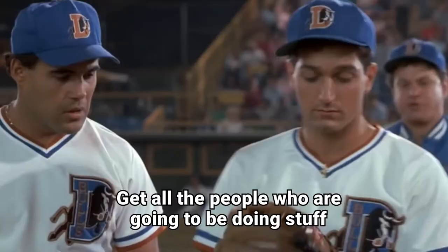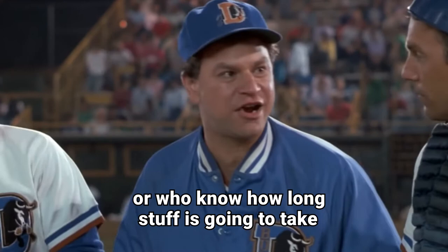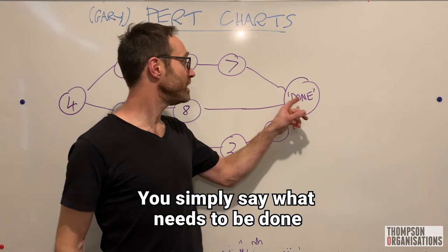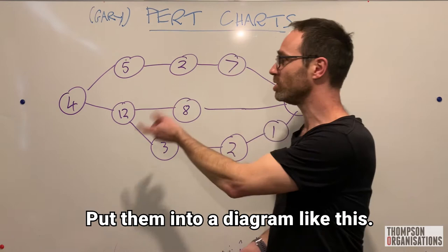How do you find these out? Get all the people who are going to be doing stuff or who know how much stuff is going to take into a room and ask them. Write down all the tasks that need to be done. You simply say what needs to be done for the project to be done. Put them all on a bit of paper. Get people to write on how long it's going to take. Put them in a diagram like this. Do it together. What do you know? You might even get project buy-in.